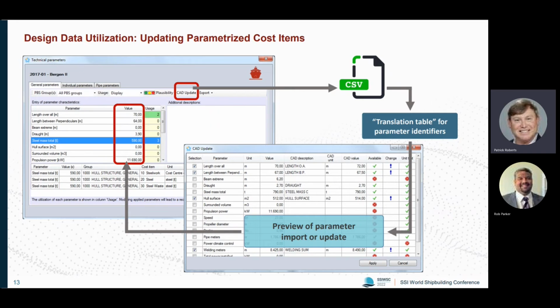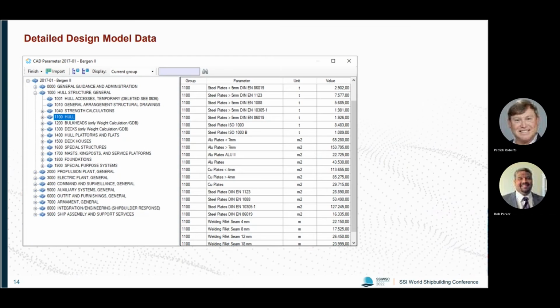Here, on a very rough level, on the project level, as we have the information about the service coding in ShipConstructor available, I can import this information also, of course, with a reference to the service code, to the product hierarchy. In this way, I have this information in CostFact available, and by clicking the update button, I can always refer to the latest version in ShipConstructor.